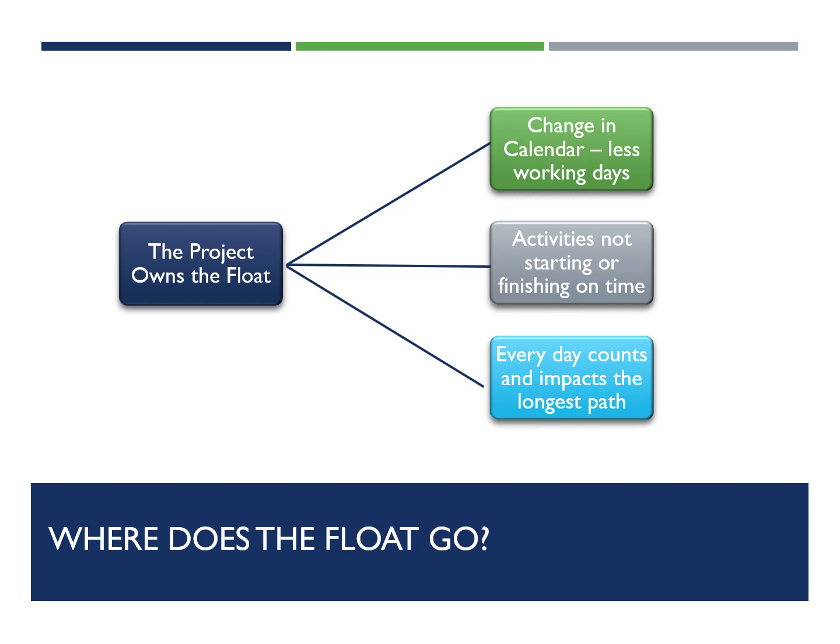Where does the float go? It's important to note that contractors will argue that the float is theirs, and owners will argue that the float is theirs. It doesn't belong to anybody. The float belongs to the project. It's a resource that's available for everybody who's involved with the project to use, and it's in everybody's best interest to not use it if you don't have to.